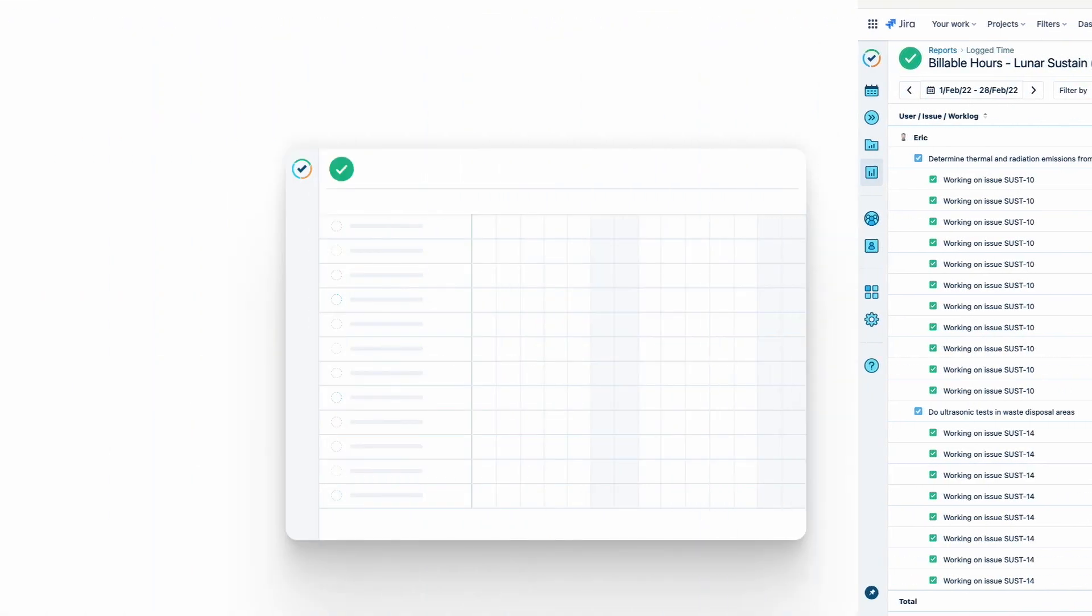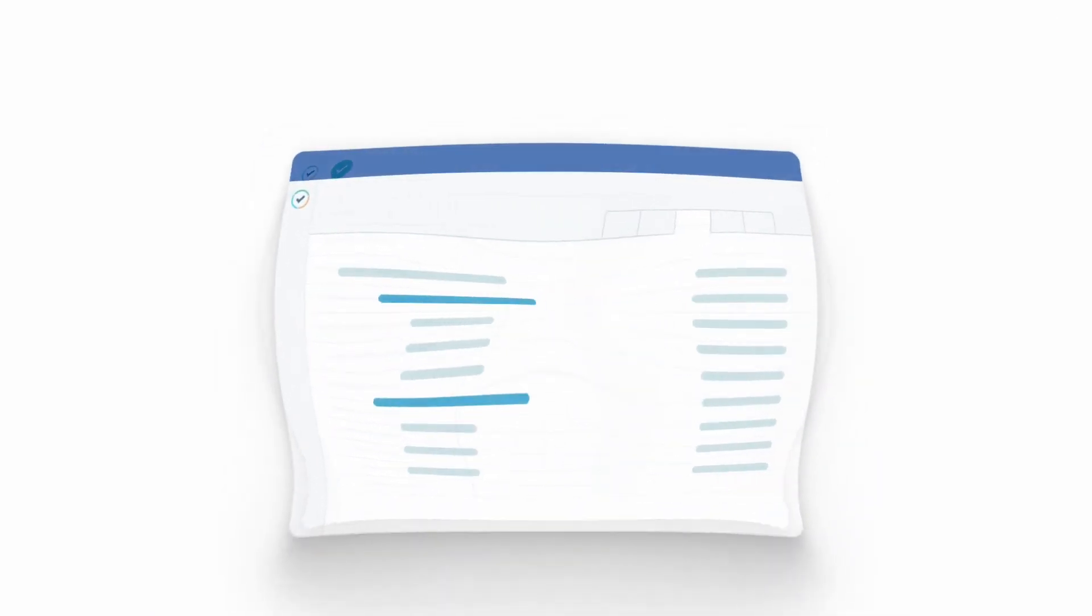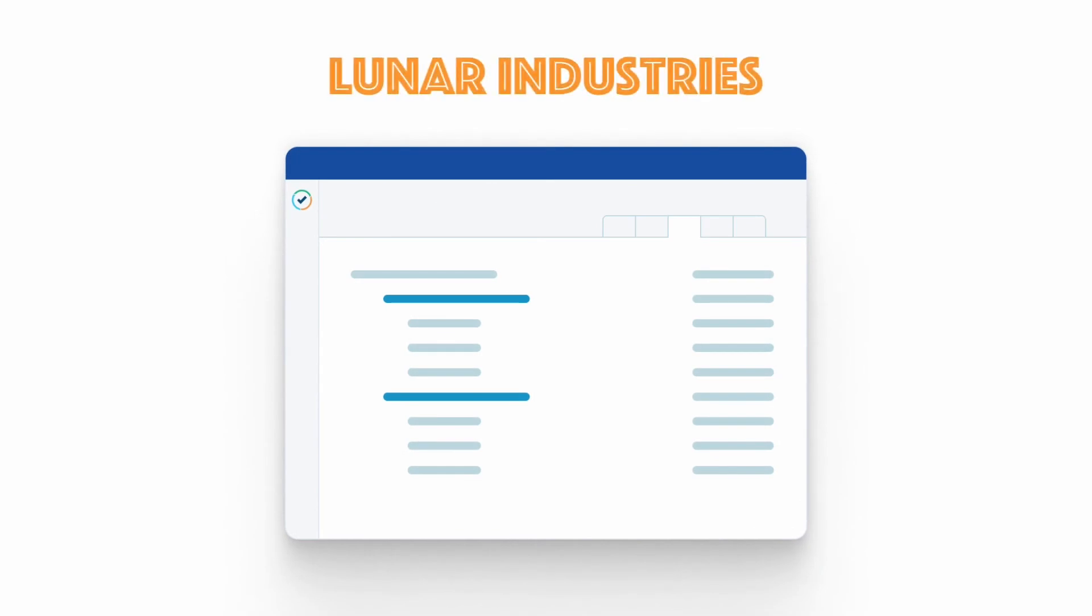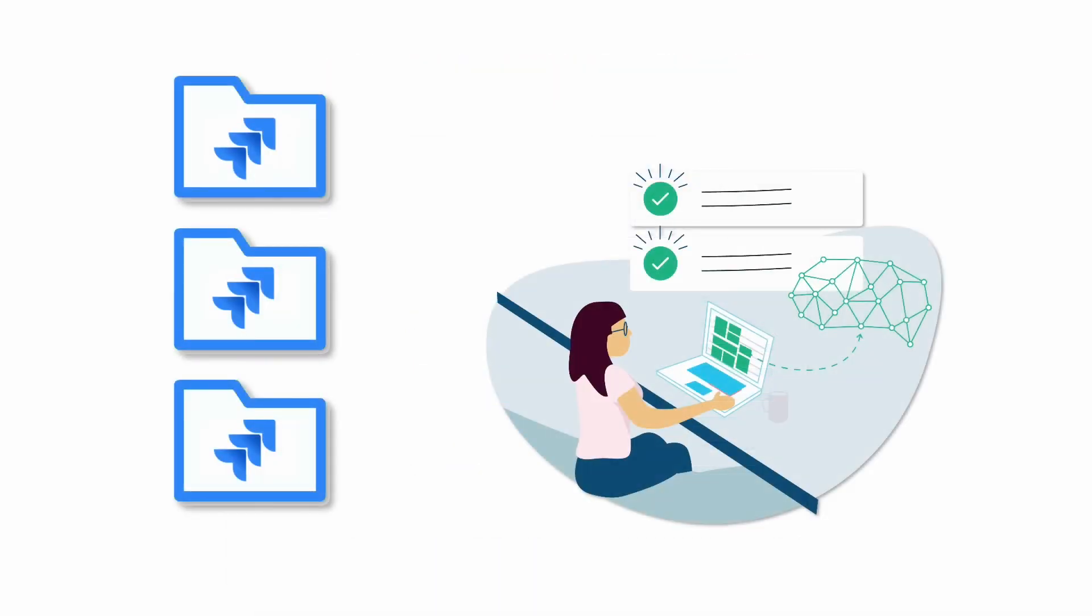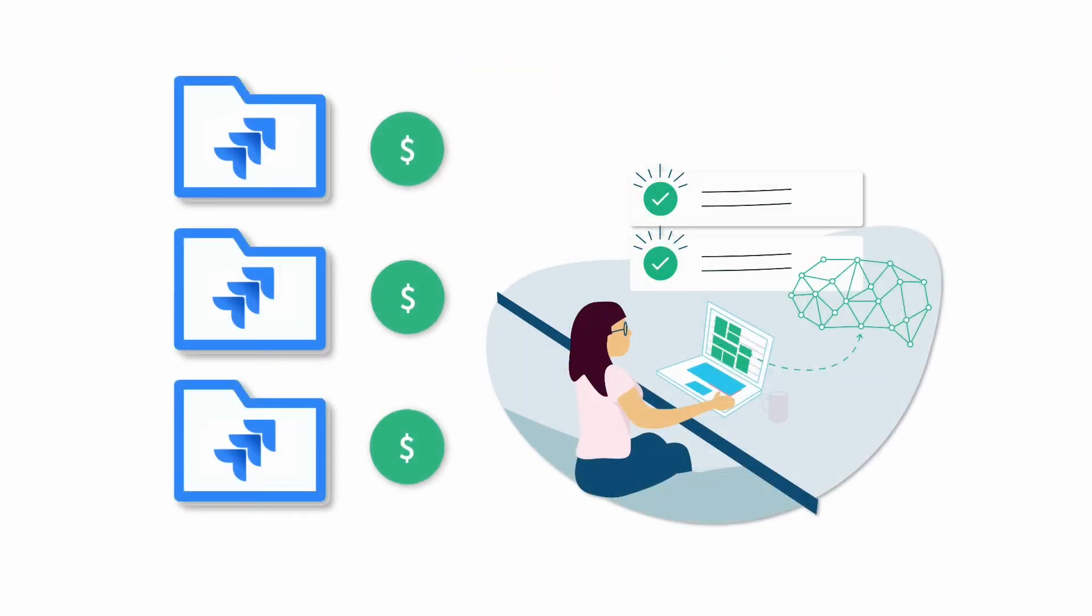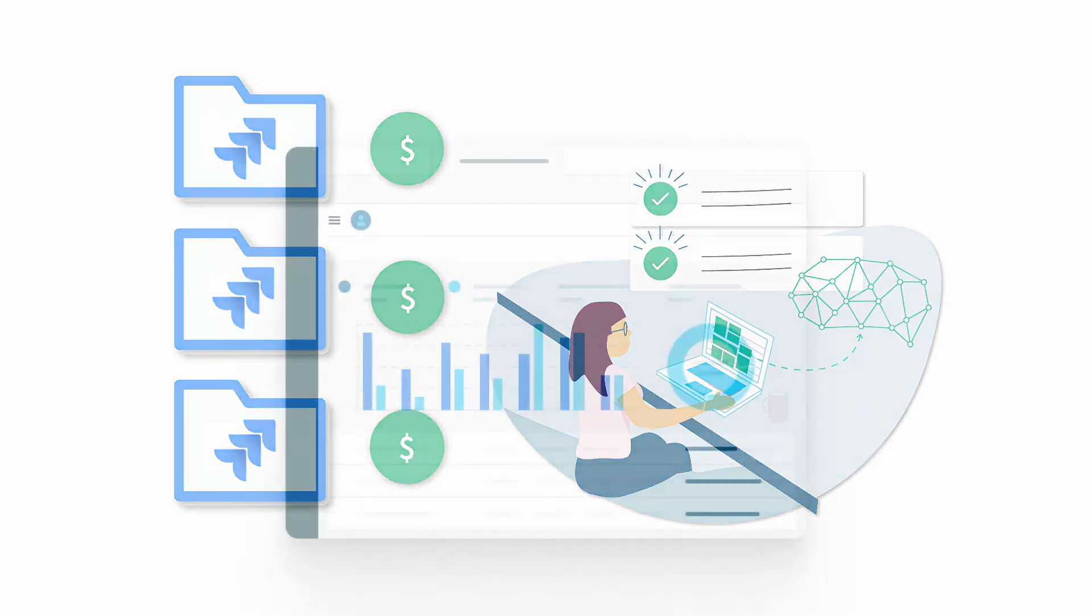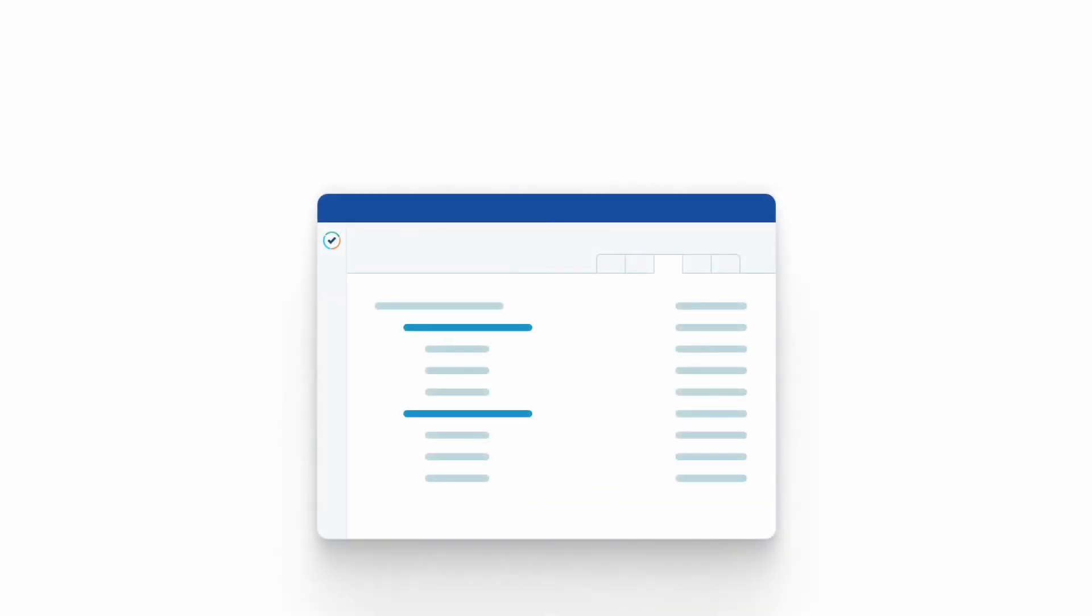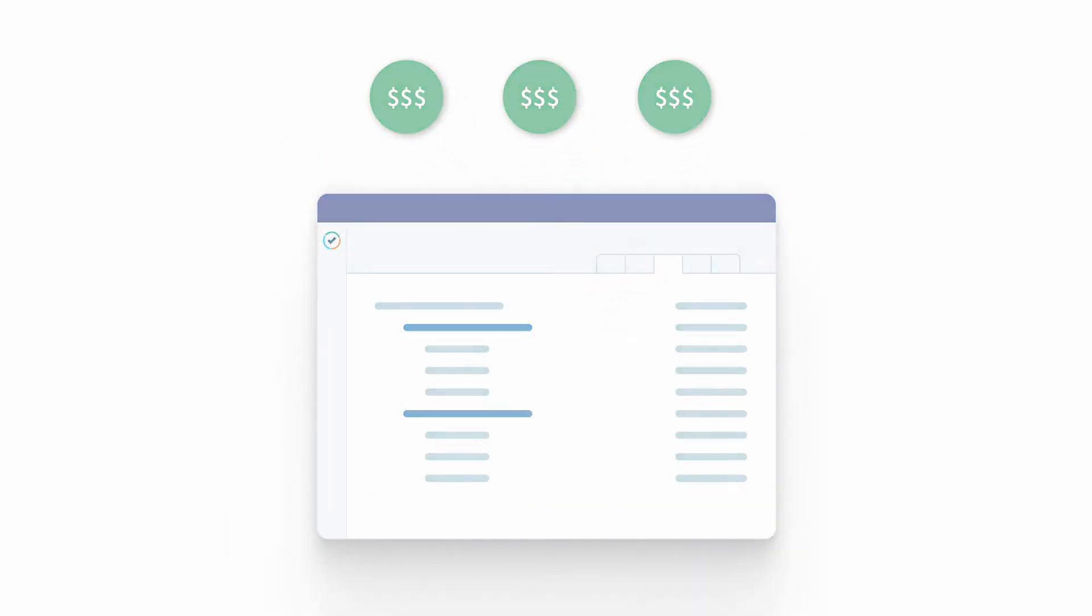He brings it into the financial software and does his accounting magic to create an invoice. Then he sends this invoice of billable hours to Lunar Industries. So that's how you can use the Billable Hours field to easily track your billable time on a Jira project. Then you can run a report on the project's billable hours as a base for invoicing your customers, and then getting paid by them.